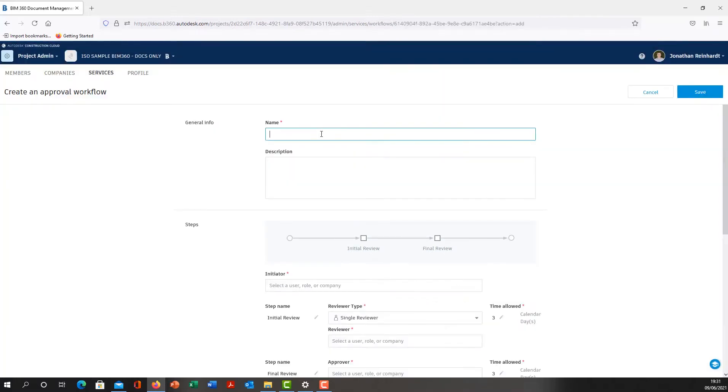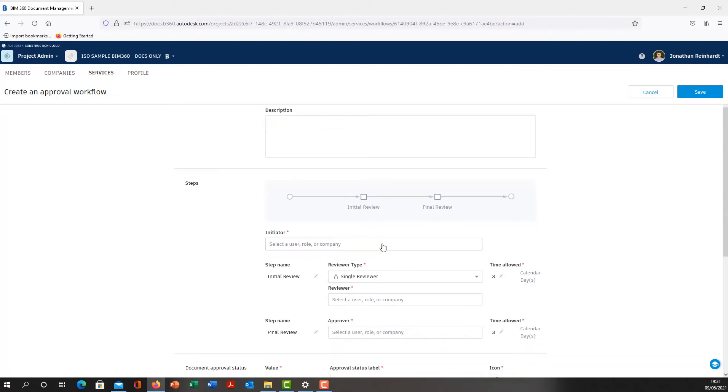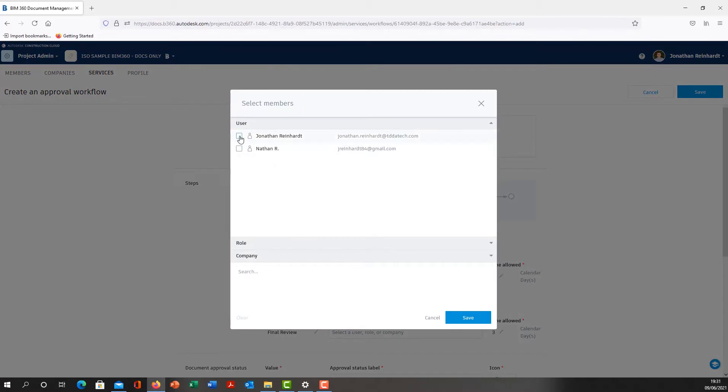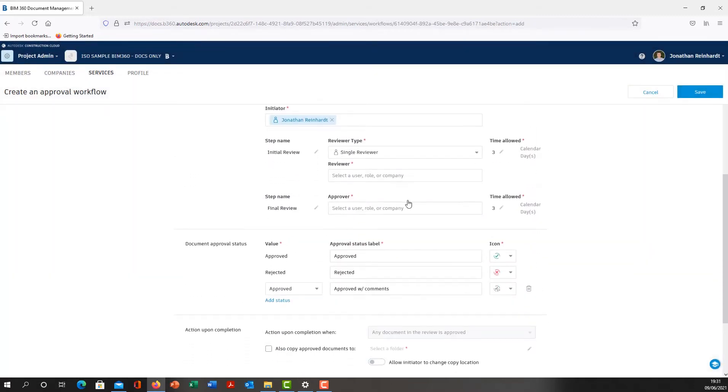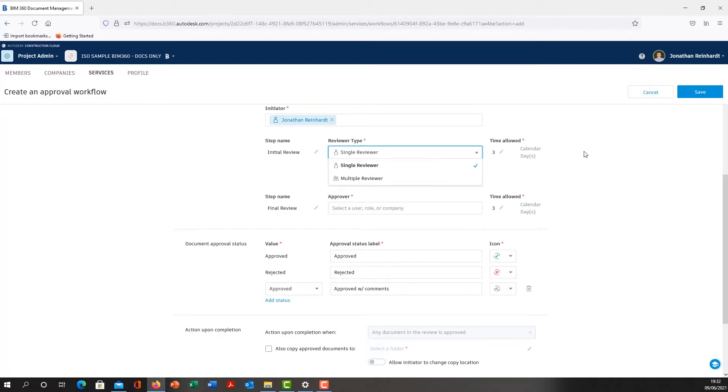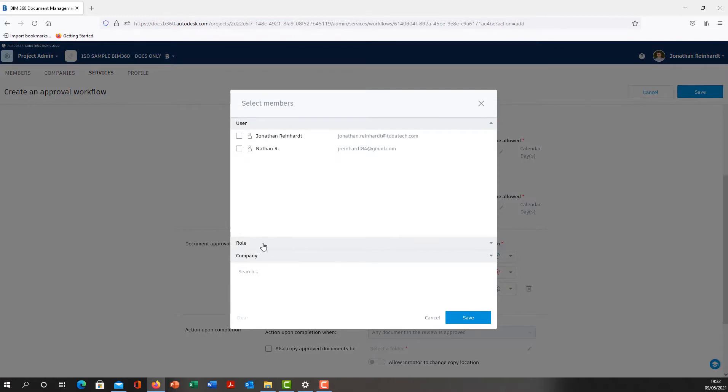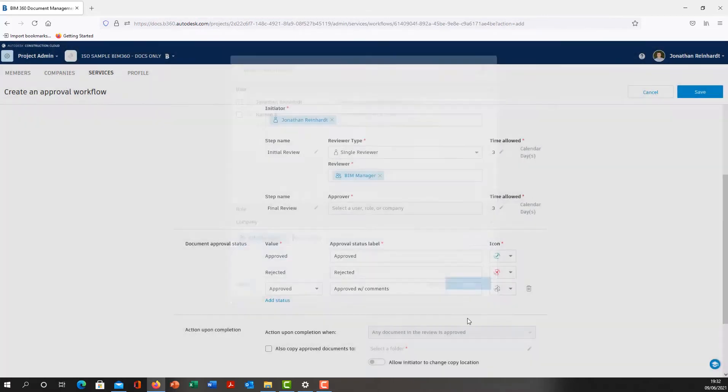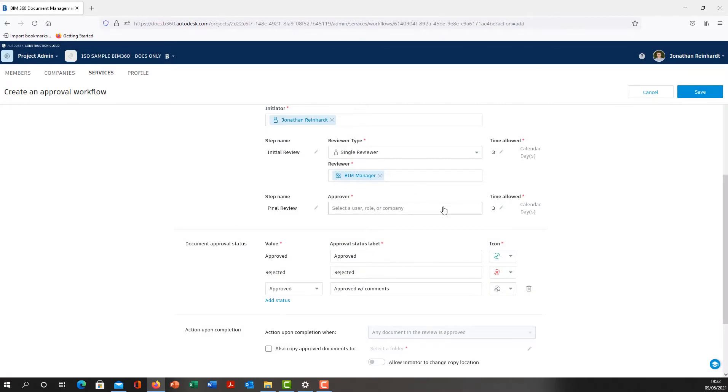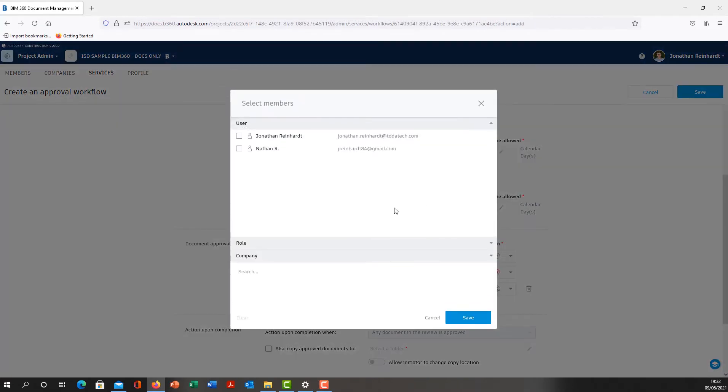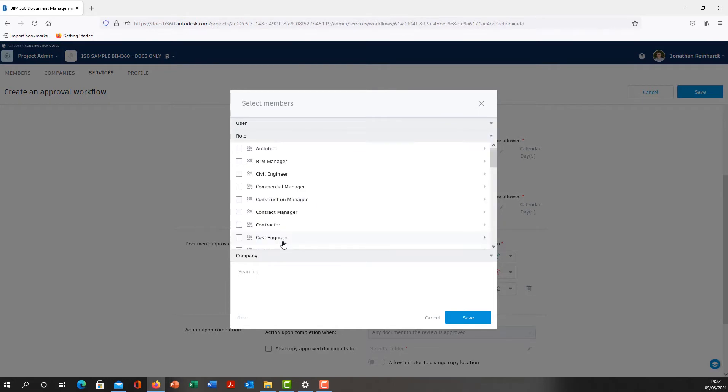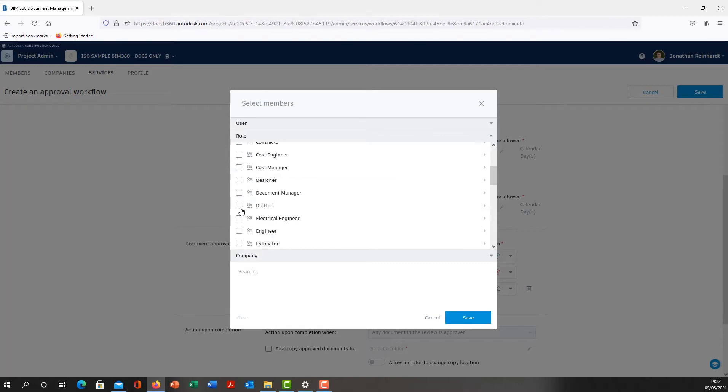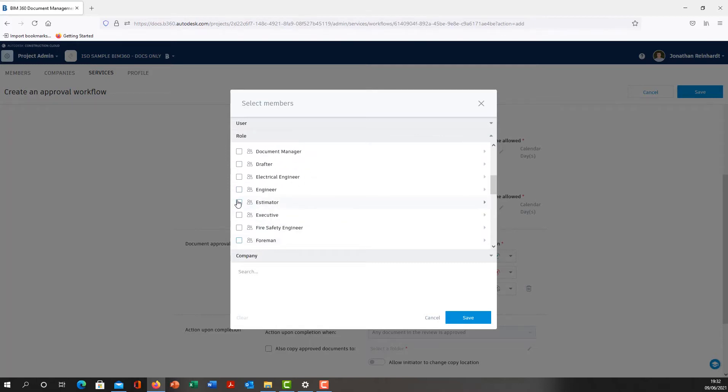We go to Next. We need to name it. I'm going to call this File QA. Select the initiator, so I'm going to select myself as the initiator. I can also select the role if I want. The reviewer type: single reviewer or multiple reviewers, so I can go to multiple people at the same time. The reviewer, I'm going to choose the BIM Manager. Then anyone with that particular role will review it, but somebody needs to approve it after that particular individual. So you can select perhaps the construction manager, contract manager, or quantity surveyor in this particular instance.